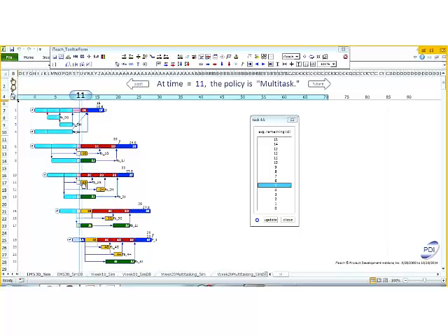Now, a question often comes up: do we need to multitask within a project? So I've got tasks from the yellow in front of me, and do I need to multitask within a project? And the policy is no, you don't need to multitask within a project, just across the projects. Reese mentions that he has no way to predict when his project will finish since he doesn't control a critical resource. Critical resource probably being that red one.